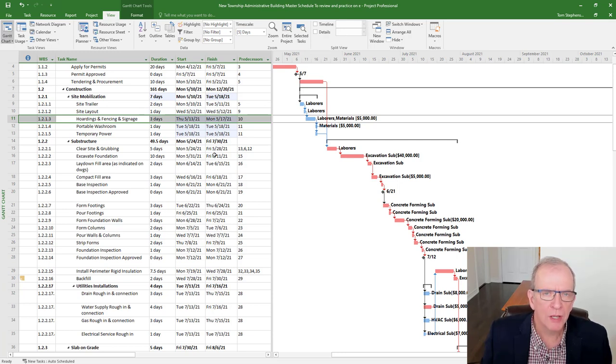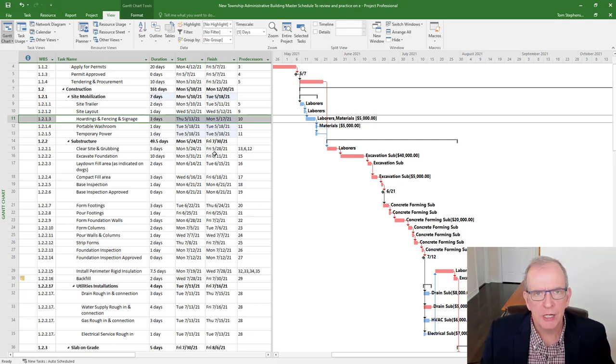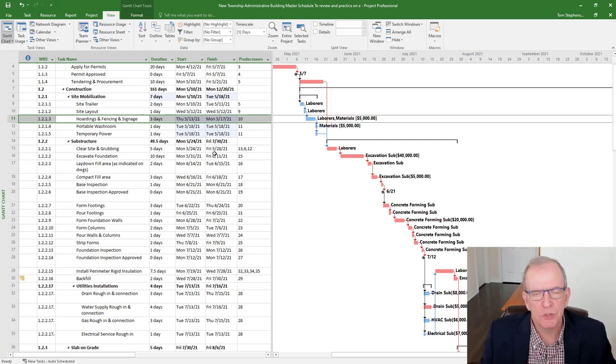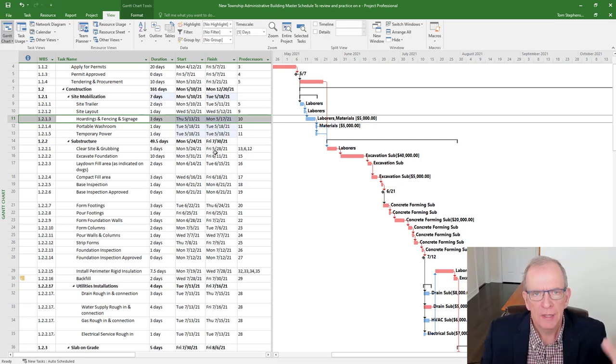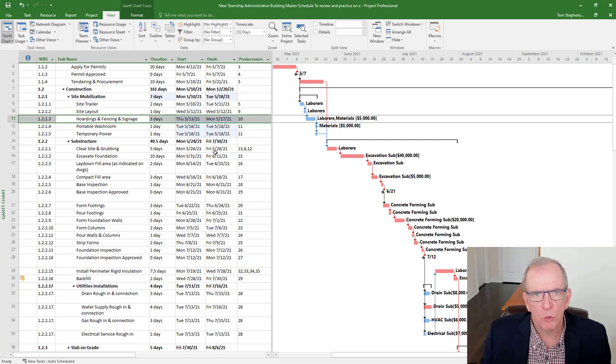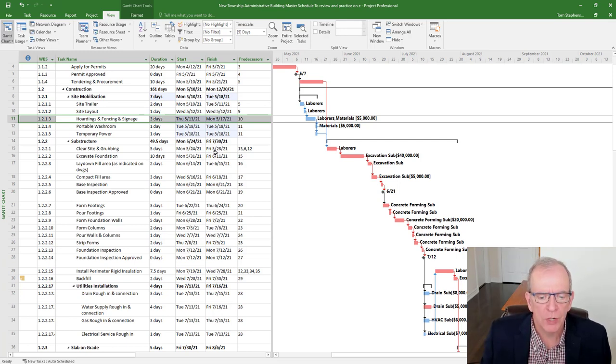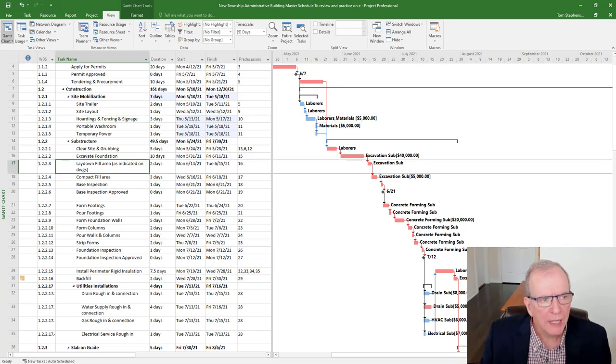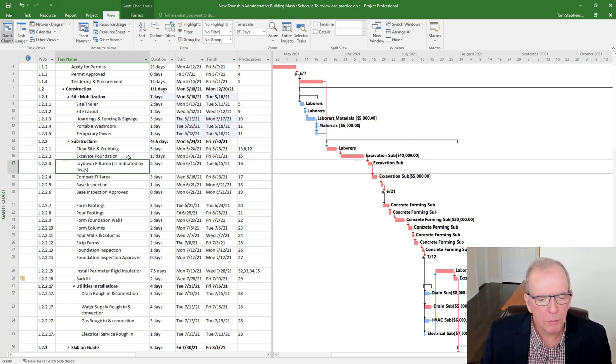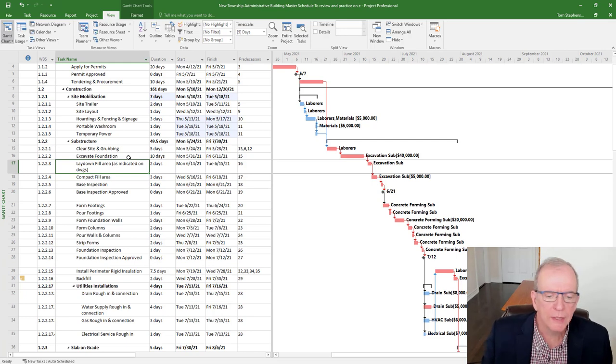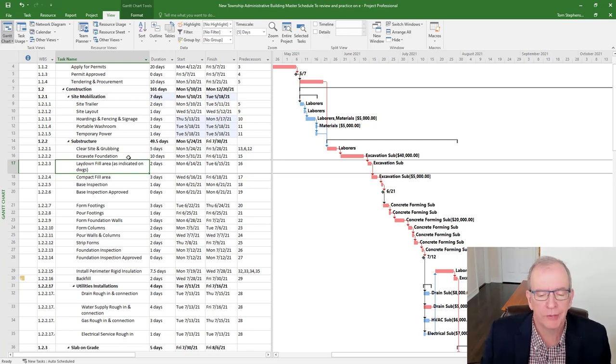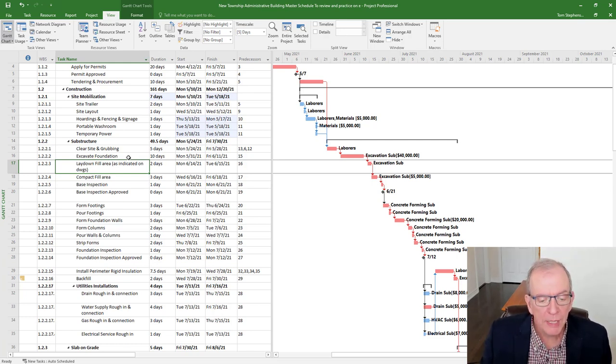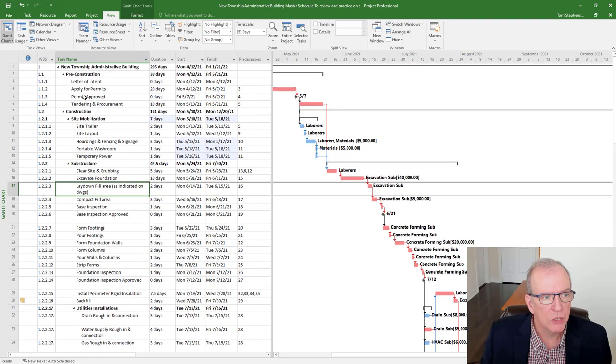Sometimes I might put a constraint when I have a change order, and I'm adding something to a schedule, and I'm just past the status date, then I might put it because it came out of nowhere. But I generally try to avoid constraints wherever possible. And as I mentioned, organize, which is so that was number two, number one was don't let the software tell you how to schedule. And number three is organize and group areas of work, as I mentioned.